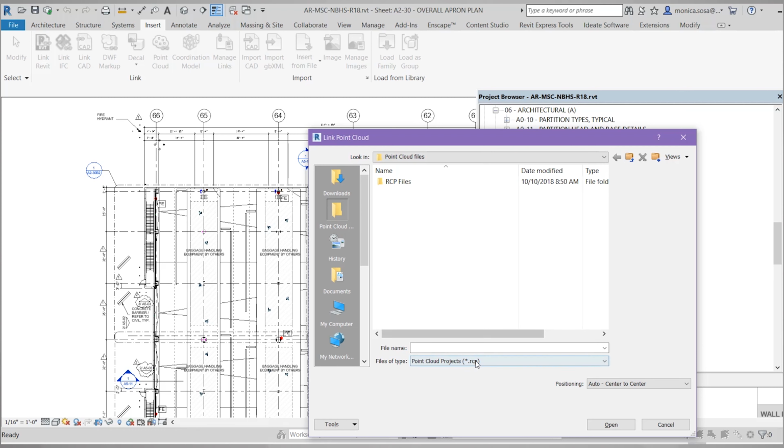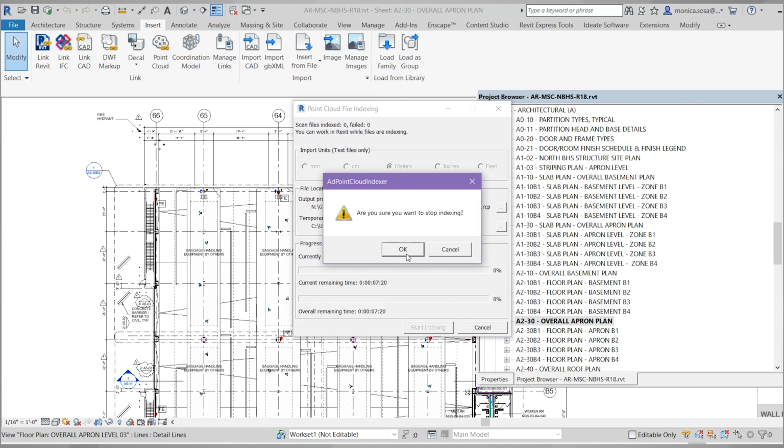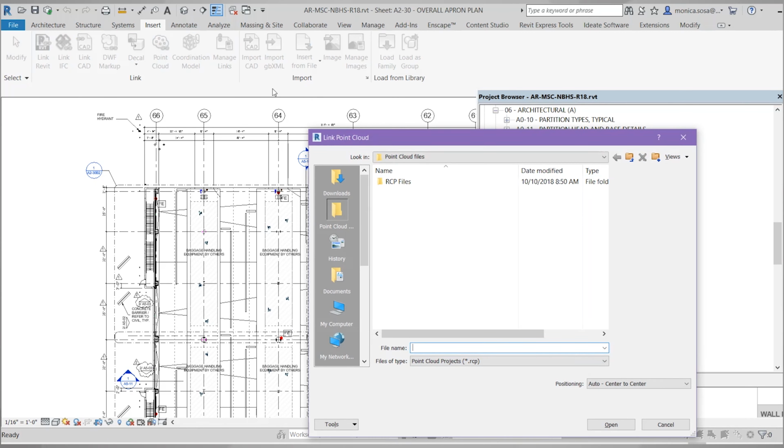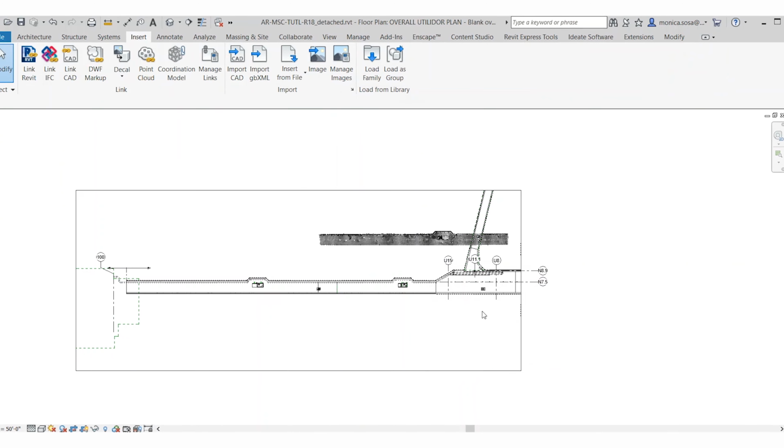If we generate the point cloud, then we bring that into our software. So depending if it's there in design, we're going to bring that into Revit. And if it needed some deleted points, we'll bring that into Recap Pro to generate that. If it's during construction and we have construction models that we need to validate against, we'll bring that into Navisworks, as well as sharing that with any of the future tenants for that space if they require a point cloud for that area.